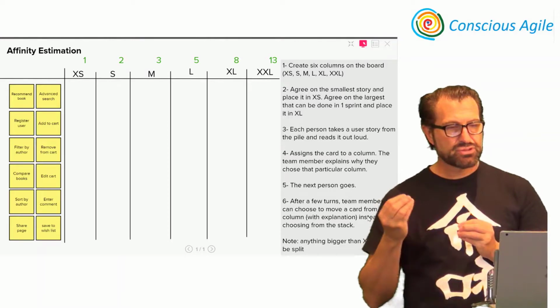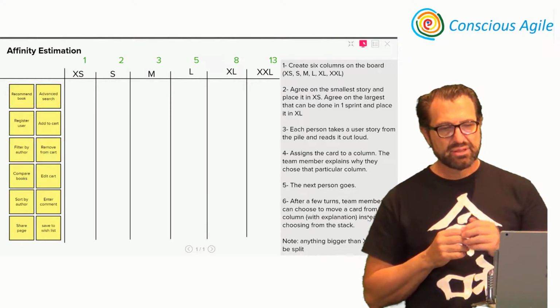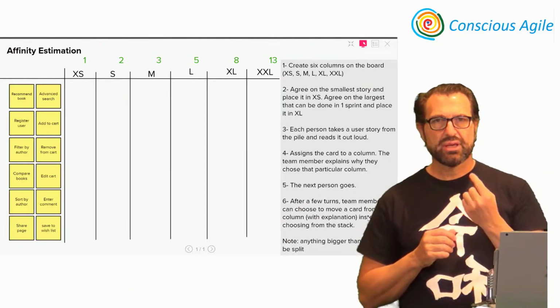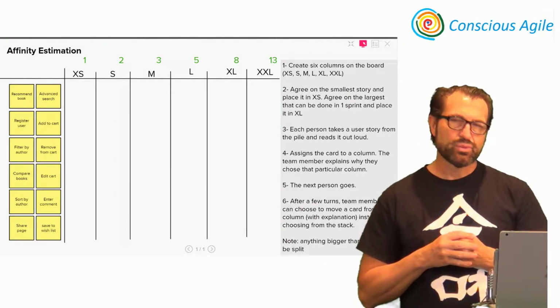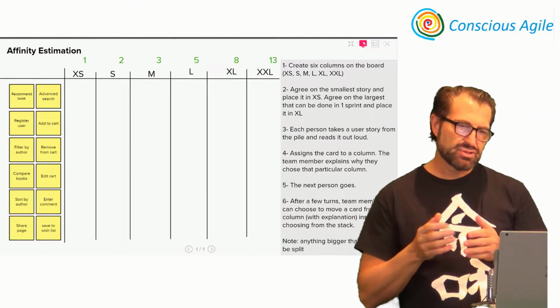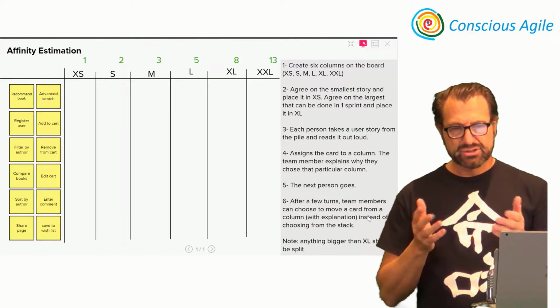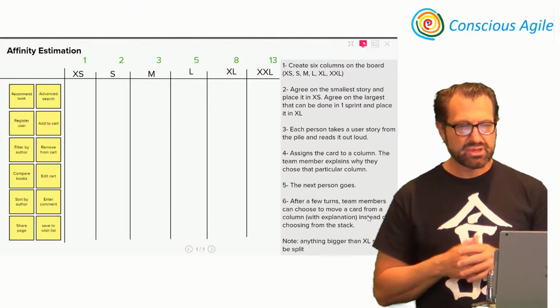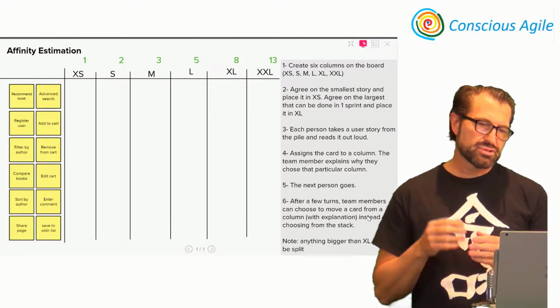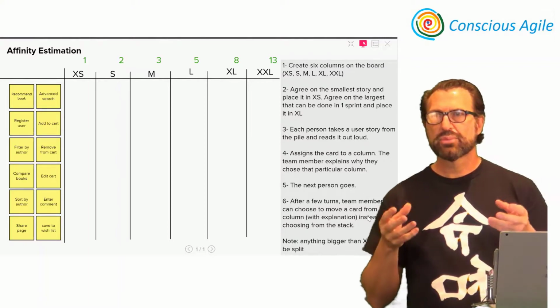The idea is to use t-shirt sizing, and each one corresponds to a Fibonacci number. So XS is a 1, and S is a 2, etc. So you can translate those t-shirt sizes into numbers really quick. The reason to use t-shirt sizing is that we don't think about absolute numbers.